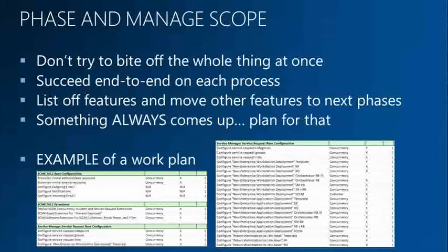All right. The last piece of this, and something very, very important, is using a phased approach. I can't stress this enough. Service Manager engagements, because they're not just deploying an Exchange server, they're not just deploying an SCCM server, have a big opportunity to go into scope creep land. Because everybody's like, oh, can I do this additional function? Can I do this additional field? Can I track this kind of asset? Can I track this kind of request? What if I ask for, that's nice, but maybe if I had it do this other thing? Well, that other thing might be a 40-hour task that takes a lot of extra automation to do, right?